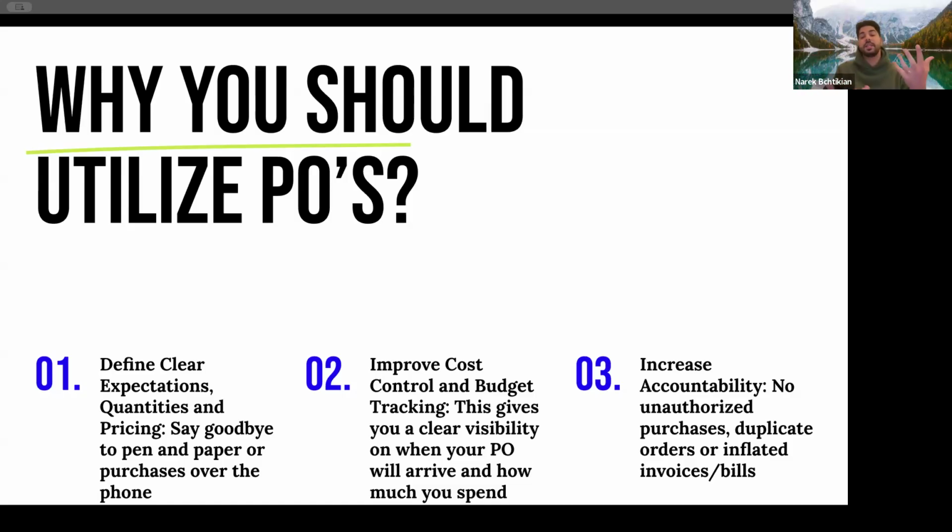And another good thing is that this is going to increase your accountability. The purchase order is a legal agreed document that you have with your vendors, with your subcontractors. This prevents unauthorized purchases, duplicate orders, or inflated invoices or bills that you are going to receive from your vendors. You have a purchase order, an agreed and set legal document. Nothing outside of the purchase order is going to be legal.